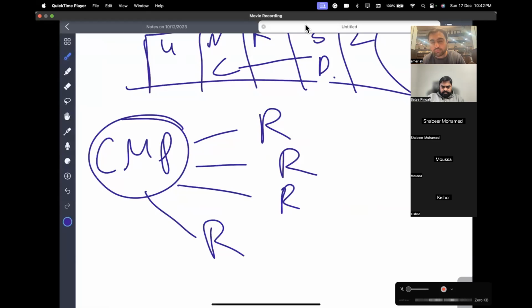Do we need interactive communication? Which type of communication is needed for each stakeholder? That must be written. Is it a written format, verbal format, daily communication, monthly communication? How detailed should the communication be? Everything about it is written in the communication management plan. We try to understand the political awareness of the stakeholders and understand their culture, their customs, their language, and the communication management plan is sent for approval.